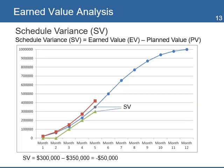Next, you calculate the schedule variance to see if the project is late or not. The value of the schedule variance is minus $50,000 — it's the difference between EV and PV. A negative number means that the project is behind schedule; the project has spent more time than planned to deliver the three health centers.